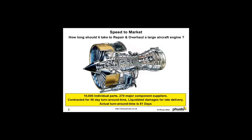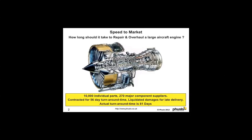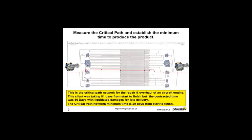So how does supply chain uncertainty influence speed to market? We need to start from a position of knowledge to understand where time is being lost. Produce a critical path network diagram for the entire process from receipt to shipping. Not many companies have analyzed their complete end-to-end process in this detail, but until we capture this knowledge of the minimum cycle time, we will not have the confidence of knowing what the ultimate goal could be.